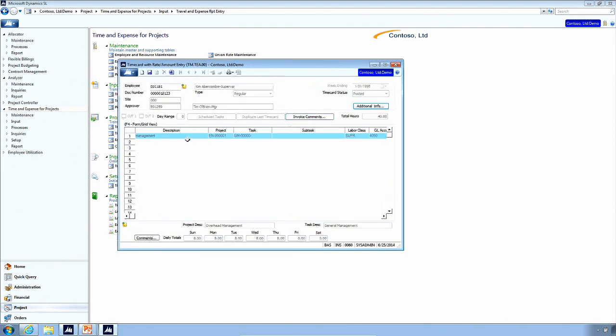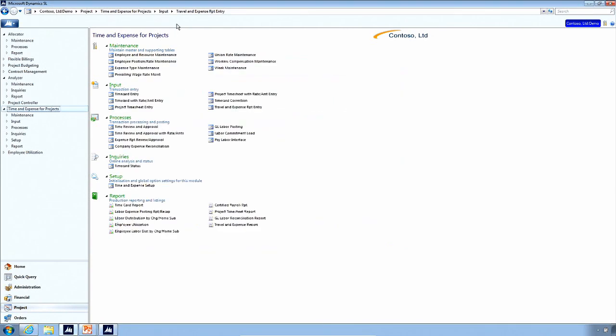So let's say we have this time card and it's incorrect. Maybe I charged to project EN 99001, which is fine, but I meant to charge to a different task. So this time card's already been posted, so how do I fix that? We have what's called time card correction. So I'm going to correct employee E1181 for 10123.